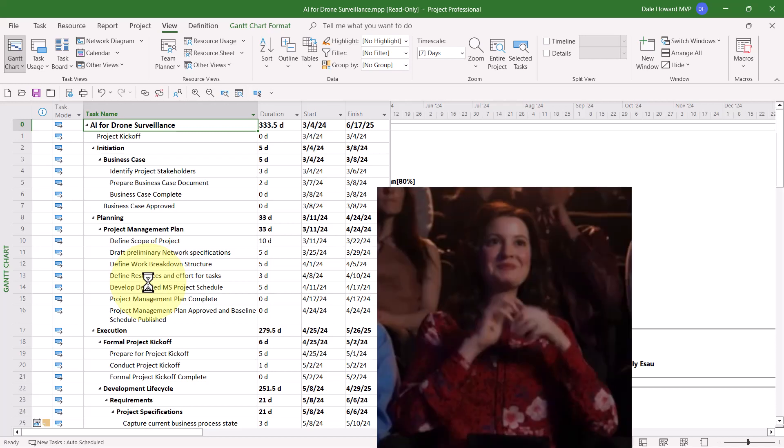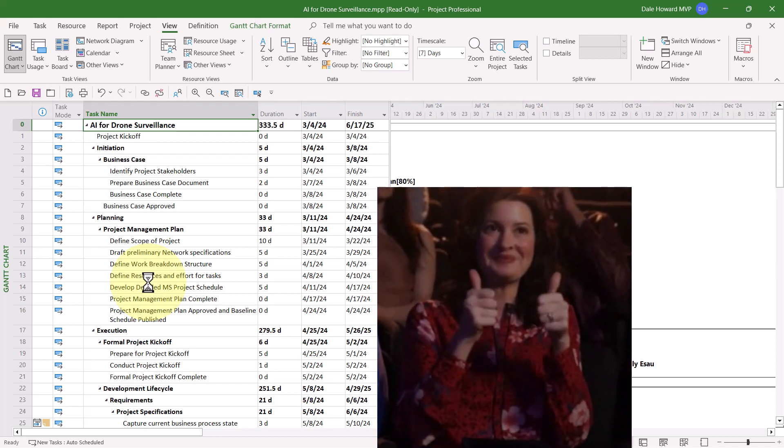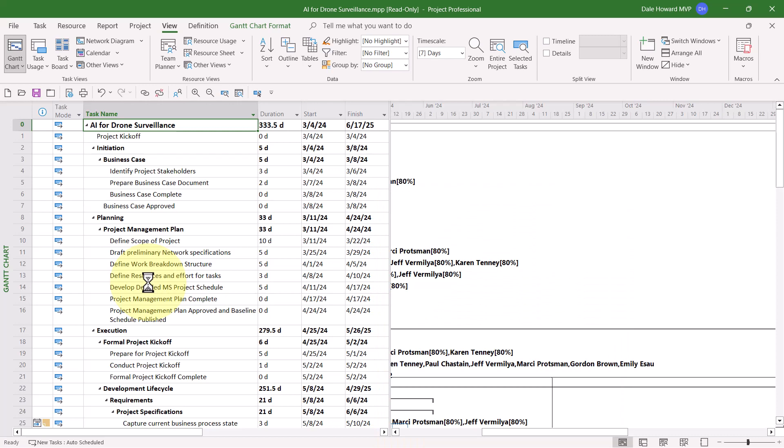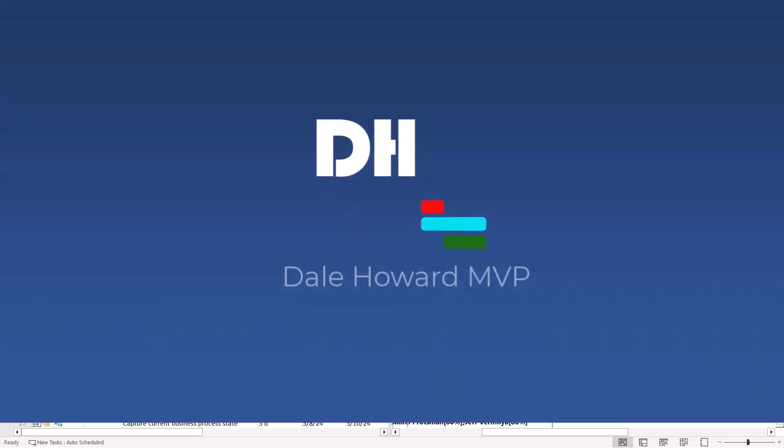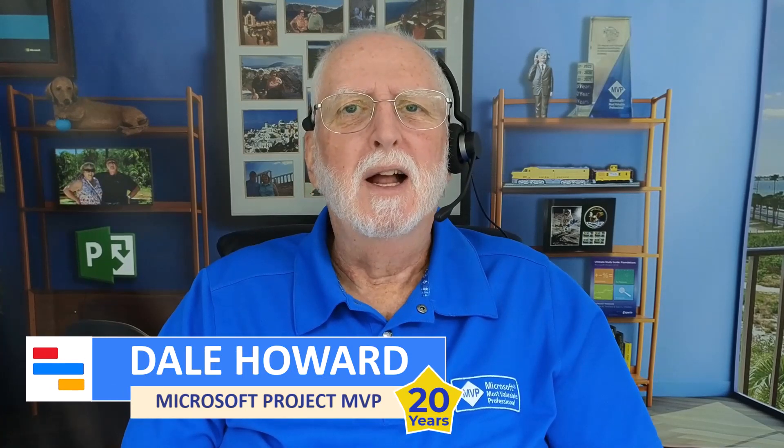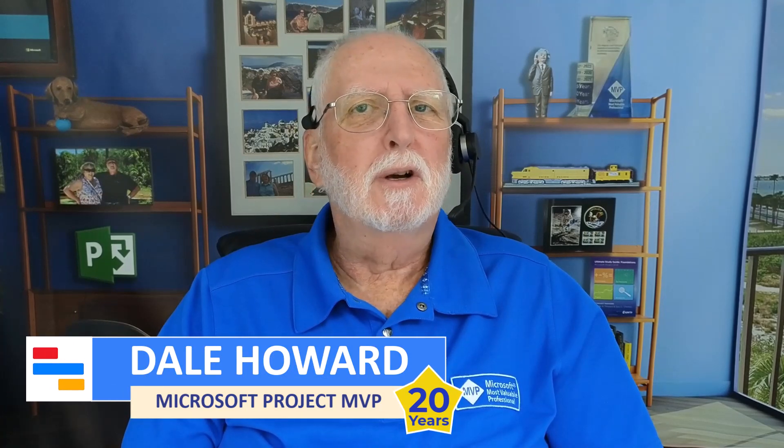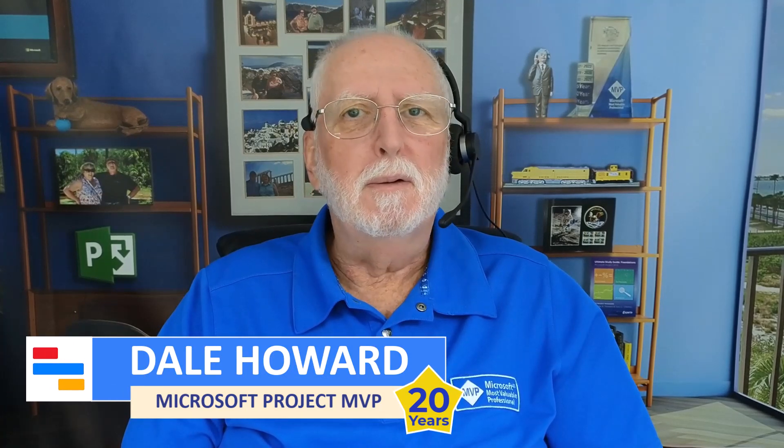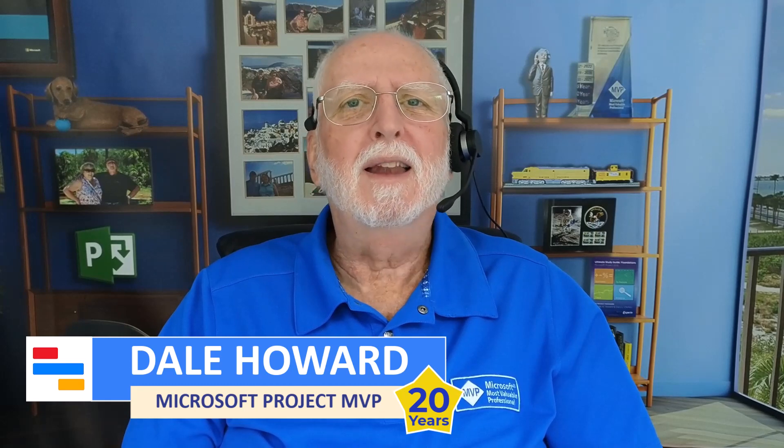So at this point, after you've fixed all of your problems with your project using those seven QA custom filters, I'd say your project is ready for baselining and to go to the execution stage of the project. So now you know how to install and use those seven custom filters to make sure that you have a high-quality dynamic project schedule. I hope you'll start using those filters right away on any project you're currently managing, and I hope you'll use them on every new project you create from this point forward.